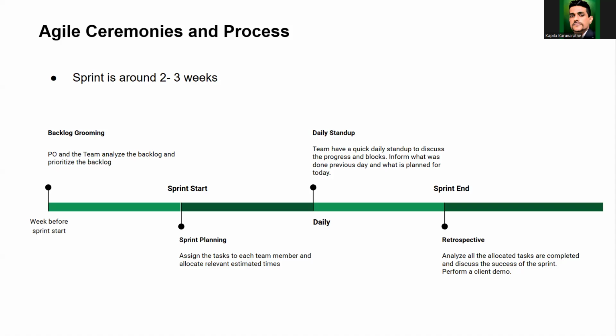Based on your status, the Scrum Master will measure the task completeness, and you move on. The daily stand-up will not be many hours, maybe 15 minutes. That's the best practice: always limit it to 15 minutes and complete it. So that's our plan basically.